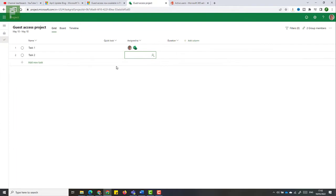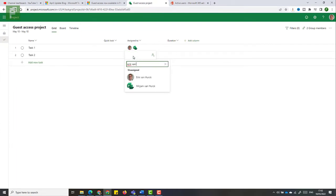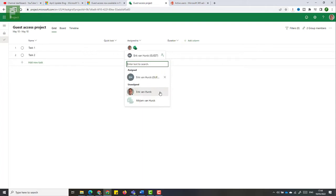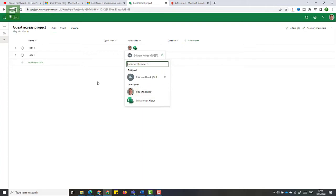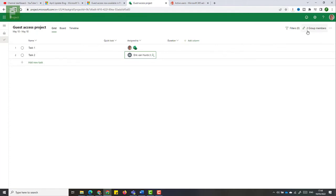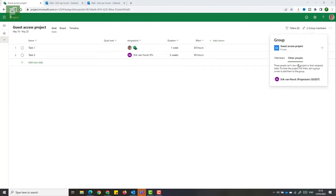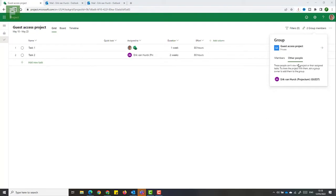But the moment that I assign this to the resource that I have available here as a guest, I'll be able to select that resource here. And that resource now shows up in the other people group of the private channel.